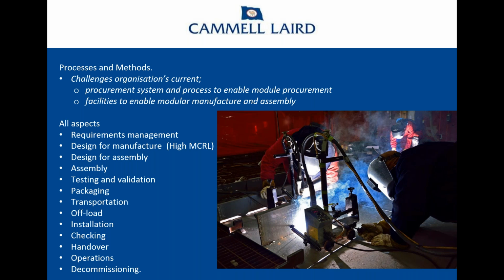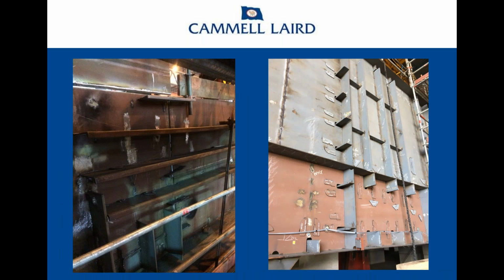All these things, I think at best we've nodded at, and I'm as guilty as the next man on that one, on projects where the further away it is, the less attention it's got. I'm afraid it's not an option anymore, because you've got to design it right first time. Because basically, once you start building one of these, you can no longer introduce serious change without really hitting the program in a bad way.